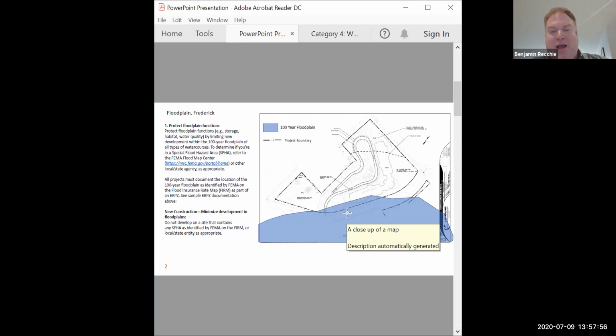So the primary way we would mitigate that is by reorienting the building on the site to avoid that portion of the floodplain. There's some other land off to the west, over in the east, that perhaps if the building could be moved around or slightly reshaped, that would be the best way to avoid building on that 100-year floodplain. We also had some discussion about other kinds of mitigating techniques, which probably aren't called for here, such as detention ponds. Someone was mentioning a project they had done where they used pervious pavement in the parking lot to act as sort of a secondary drain for stormwater. But here, the recommendation would probably be to try to reorient the building to avoid the floodplain altogether.